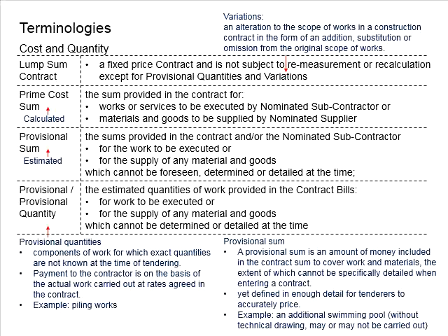It may also be due to the conditions where the relevant scope of work may or may not be carried out during the course of the construction. Due to high level of uncertainty, the relevant costs for the work are considered under the provisional sum.